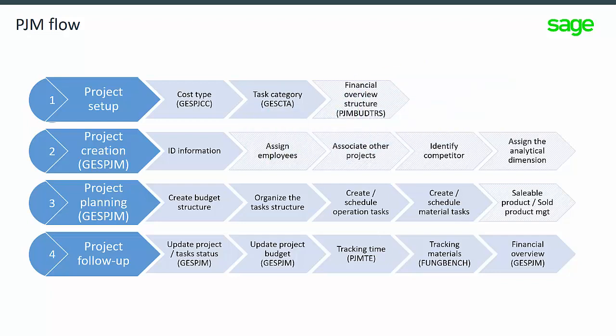To follow the project budget, you can use the budget code status. The status is set to open when the project is launched. The standard cycle is open, delivered, and closed. You can update your initial budget if the project hasn't started or re-estimate the budget.